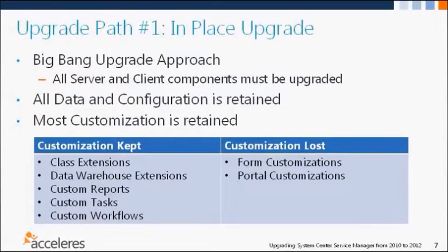Another preparatory task that you could do that might save you some time: there's a Service Manager 2012 authoring tool. It's a newer version of the 2010 authoring tool. And it may be worth rebuilding those form customizations ahead of time. That way, when you run the upgrade, if you do find that you need to move a field or anything like that, you can have it pre-built, and then it's as easy as importing a new management pack as opposed to having to scramble to rebuild the form customization at that time.